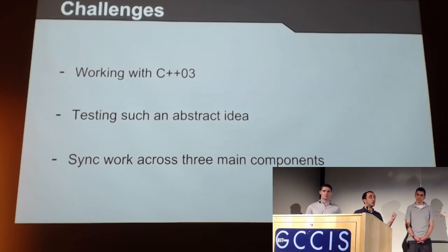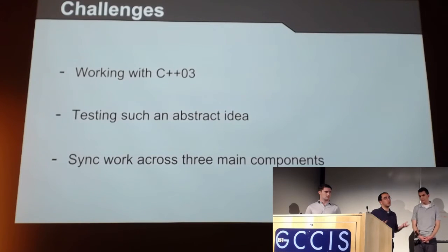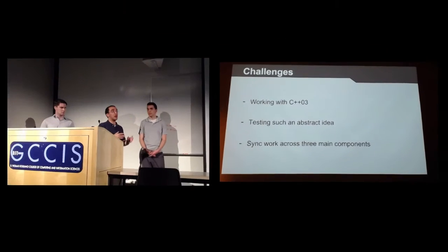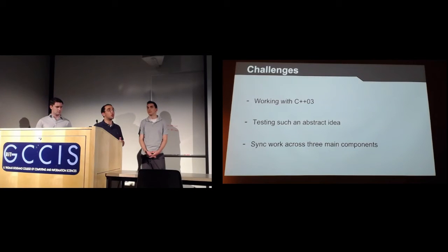This semester, we focused a little more on our process, which is the iterative process. We have one large iteration, which is essentially a semester, but this semester we also iterated every week. We began the week by planning what we wanted to do. Tuesday was a status report, to see what we're doing and whether we were blocking each other or not. Then we tried our best to resolve those blocks then and there, so that over the weekend we could keep progressing, and then we just repeat that. And that really helped us move the development along.